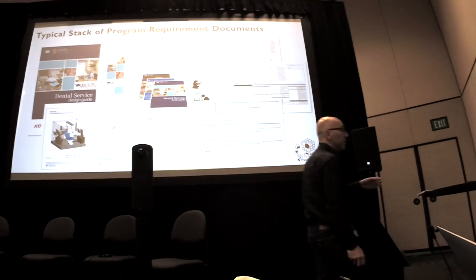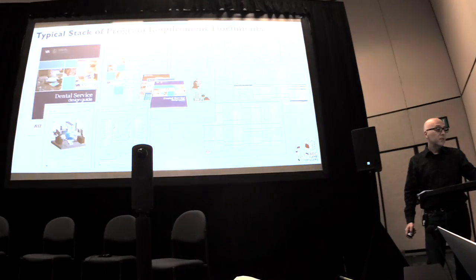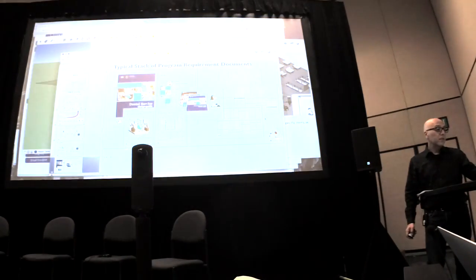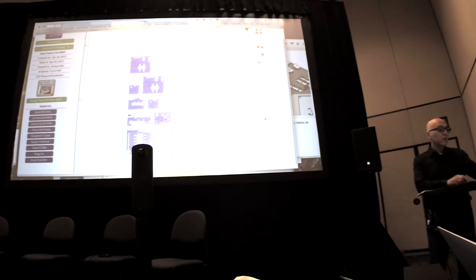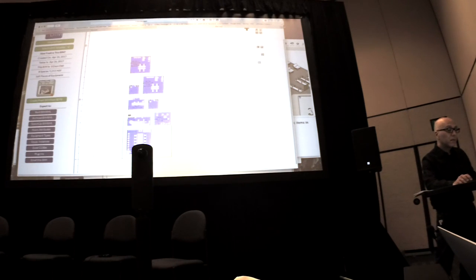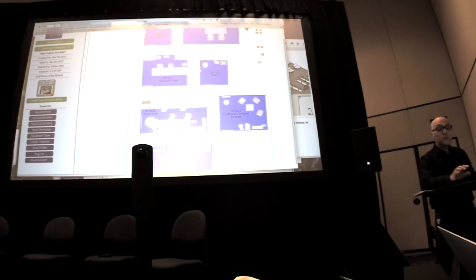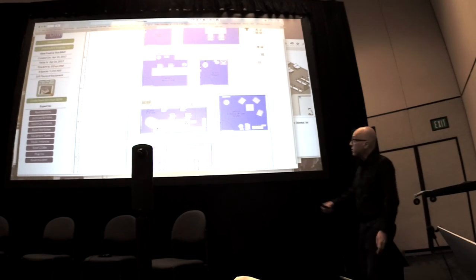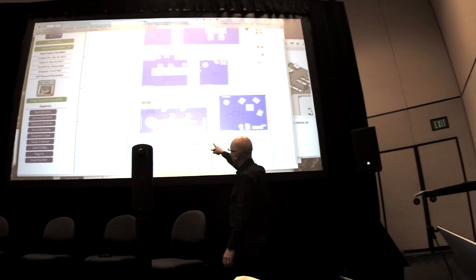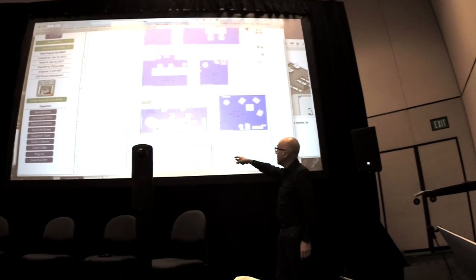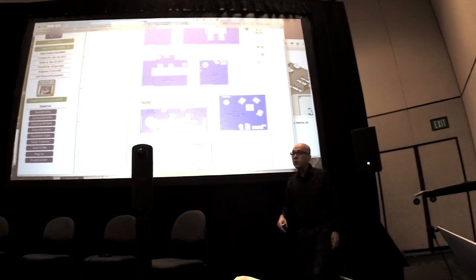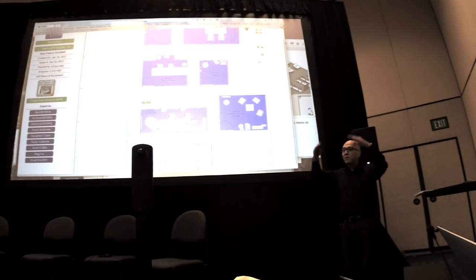In fact, you can even see. What happens if they add 50 square feet to the room? It'll update the model. In fact, I'll show you an error that they have in their database. See that nurse's station right here? Do you think that equipment is going to fit in that nurse's station? That's their database saying this is how big a square foot we want, and this is the exact equipment we want in that nurse's station. There's probably a reason for that, but we caught all kinds of errors that you just would not catch in lists of things.